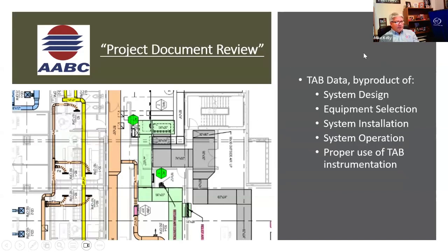Project document review, I talked about that a little bit. We want to compare the system design to the equipment selection, system installation, system operation, and proper use of TAB instrumentation. If we stick with these four top bullet points here: system design, equipment, installation, and operation.